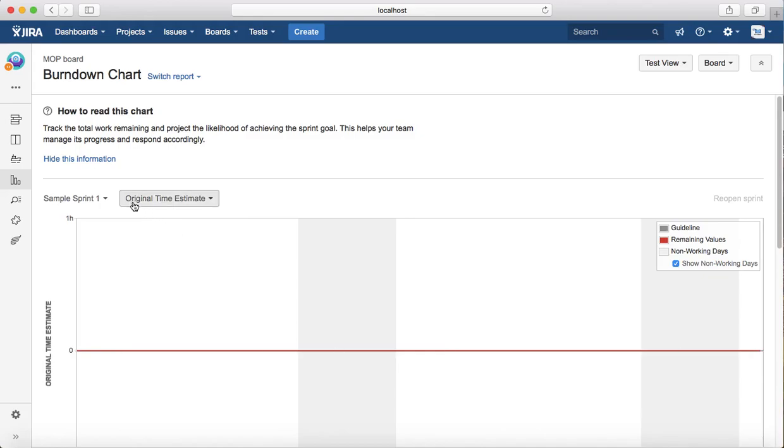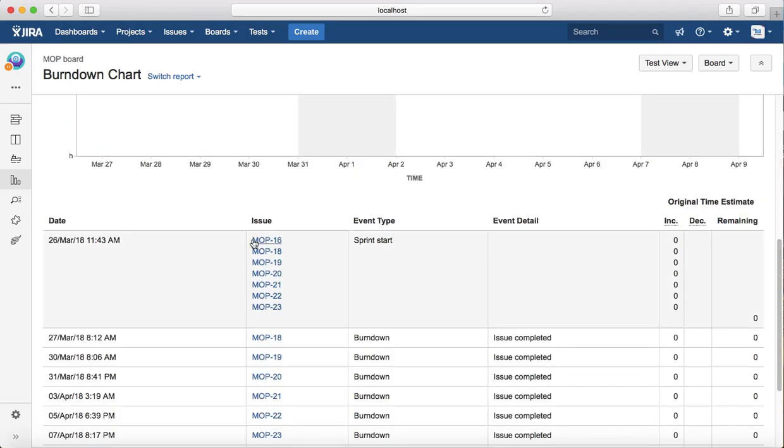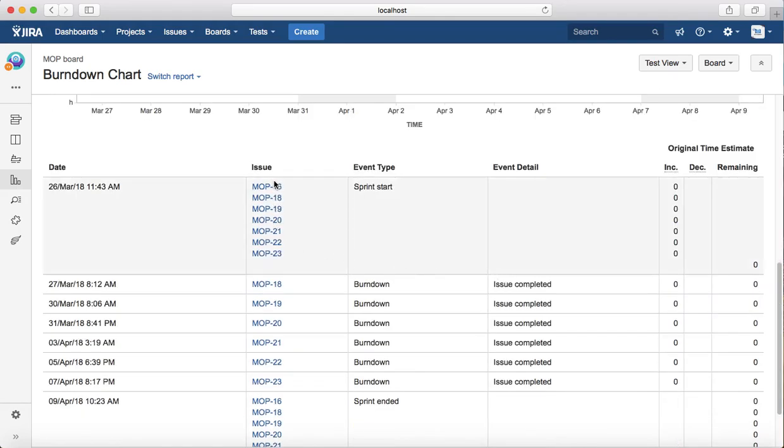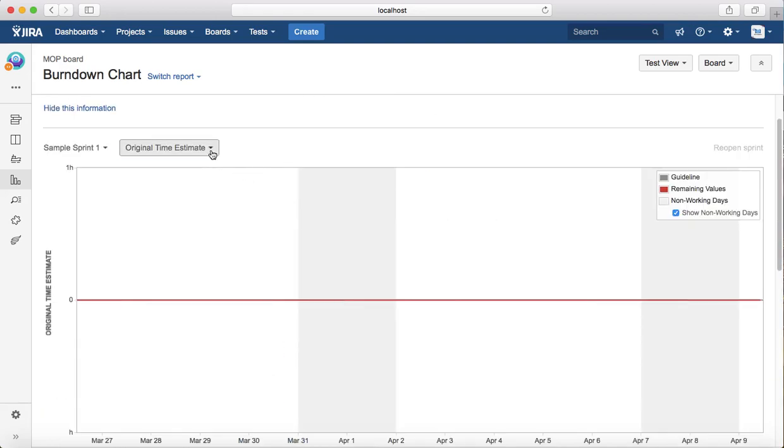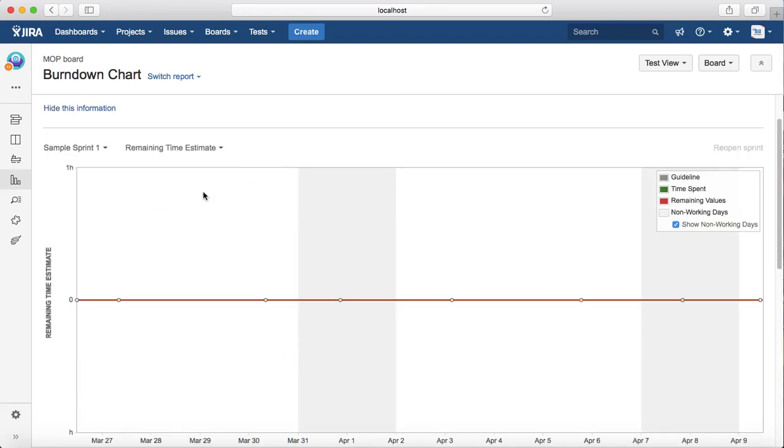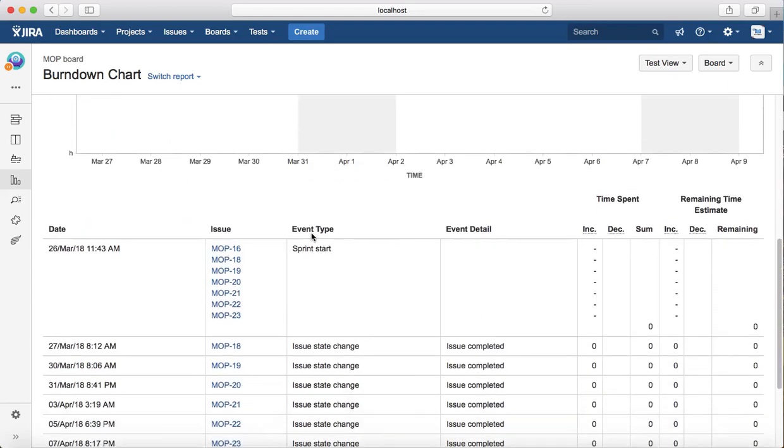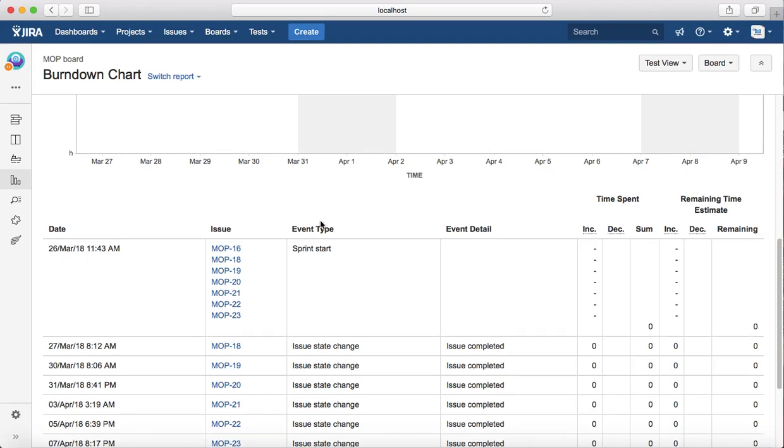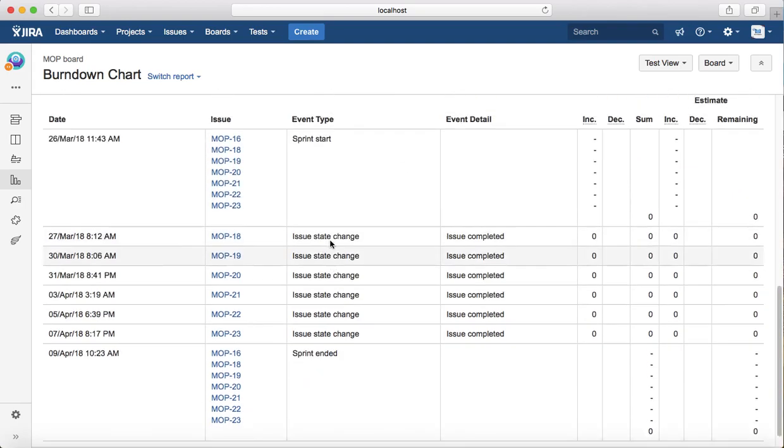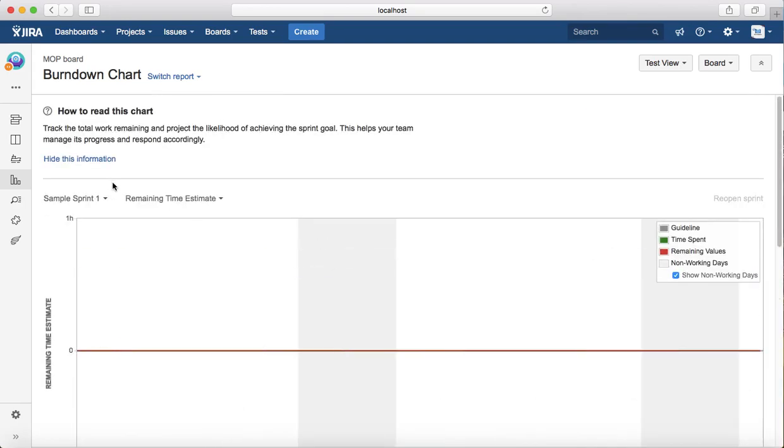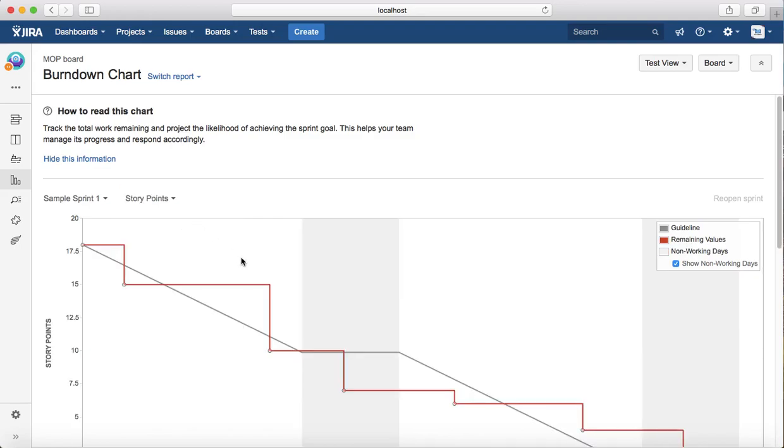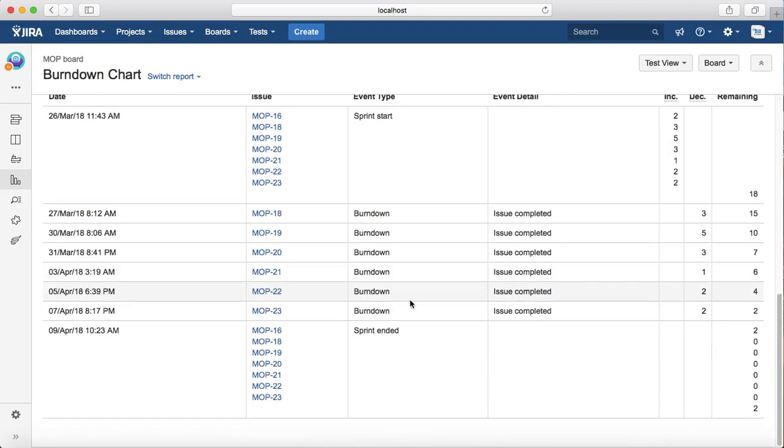The other option is you can do it by original time estimate. Because there hasn't been any time estimate done for these tasks, you don't see any burndown chart for the time estimate. But if you have done the time estimate for the issues, then you will see the burndown chart based on the original time estimate and remaining time estimate. As soon as you time estimate the issue and your team logs in the time they have spent on that particular issue, you will see a similar burndown chart as you have seen for the story points.